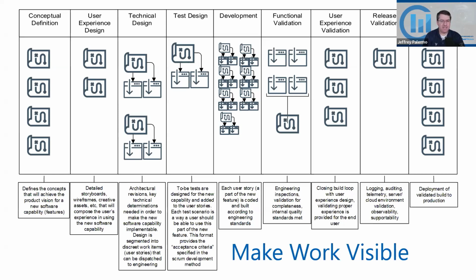And then move it along to test design, which gives us our definition of done for that particular feature or change. We break it down into its piece parts and we determine how many exception paths we want to support, what the real scope of it is. And now with those four decisions made, we can send it on to the people who are doing the programming. And of course, those people participate upstream as well. But now it's time to actually write the code.